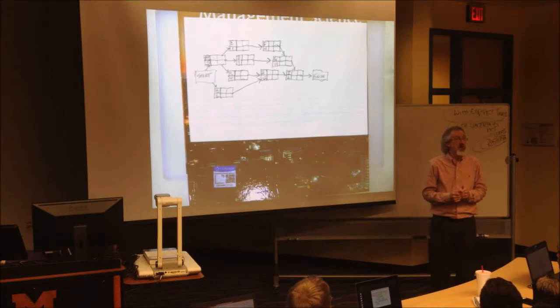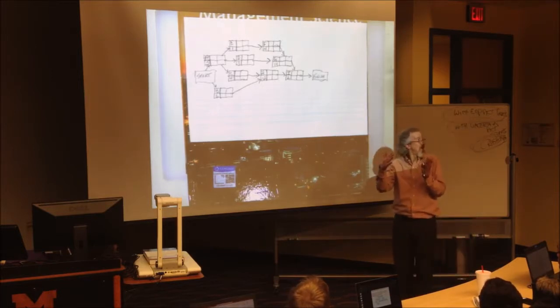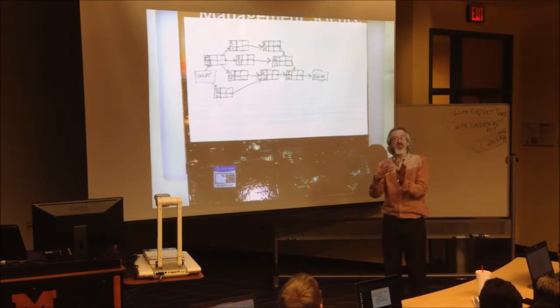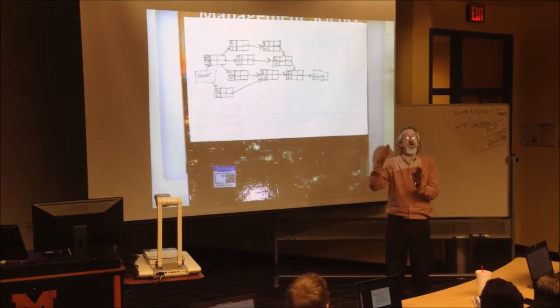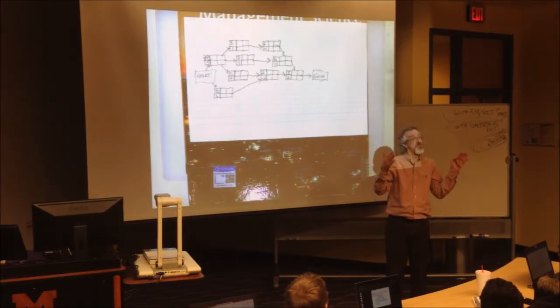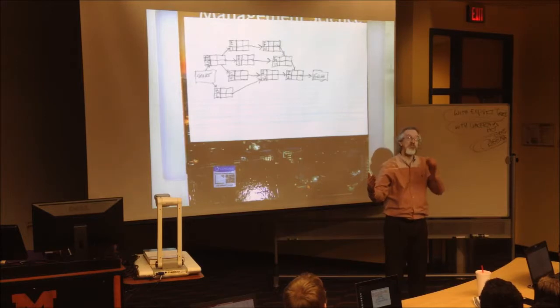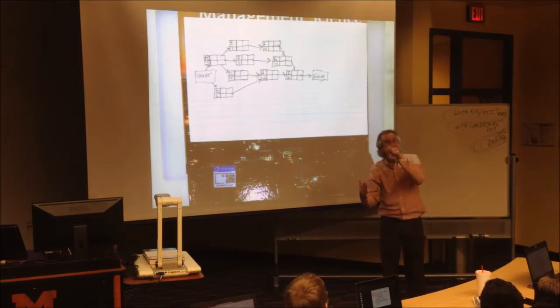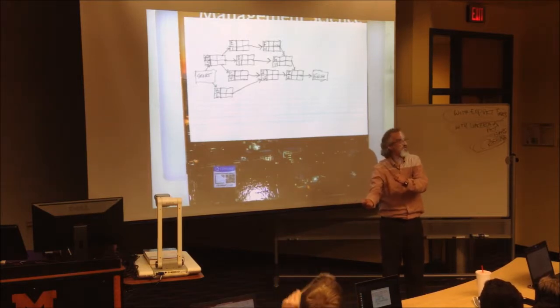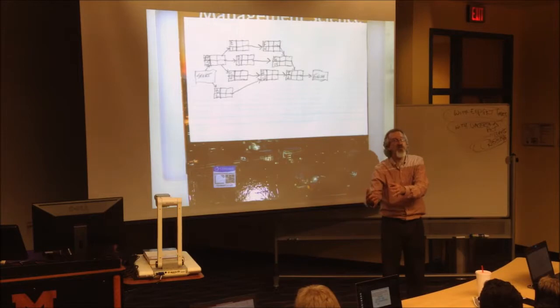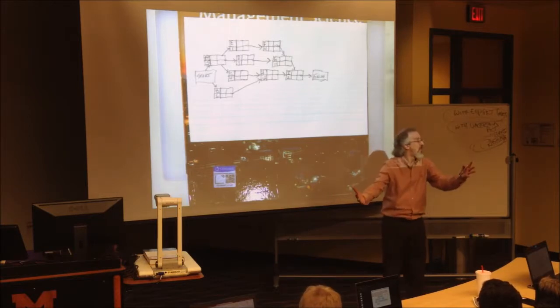Now you start to sweat. Because as you get towards the last third of this project, you just got the last third of the money, you now have all $1 million, you're paying interest on the $1 million, but it's already been agreed upon before you ever start this loan that there's a date that you have to start making principal and interest. That principal part of that payment is like 10 times just the interest part. Your loan payment goes from like $500 a month to $5,000 a month.